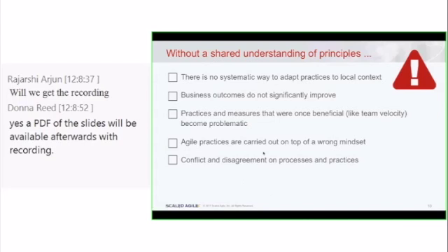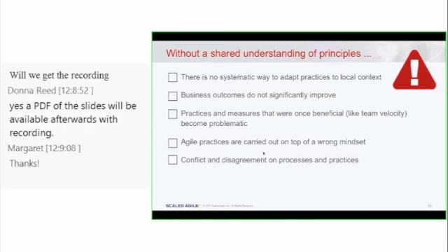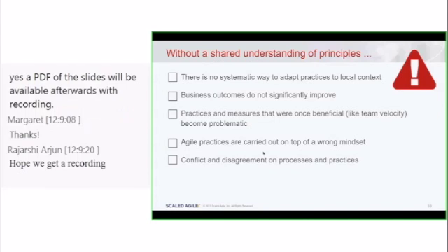For instance, they're having daily stand-ups, but it's really kind of a status report for the manager. Or they're having retrospectives, but nobody says anything. Or when the team says what's wrong and names the things that need to be fixed that are out of their control, nobody in management seems to care or does anything about it. Those are symptoms that, when we see them, we go, okay, it looks like we're paying lip service to Agile, but we're not really doing it.